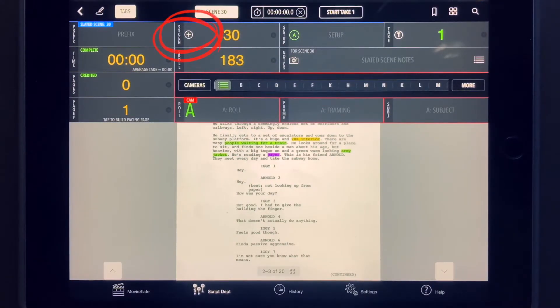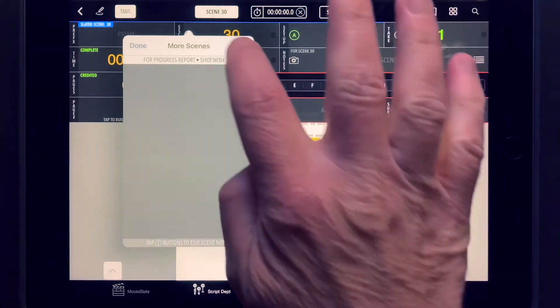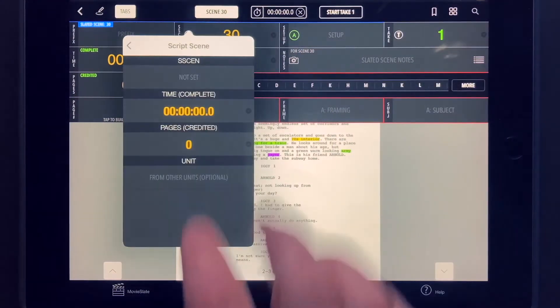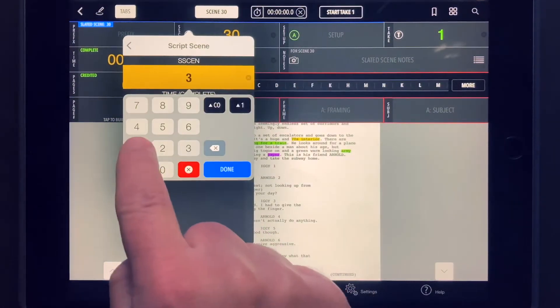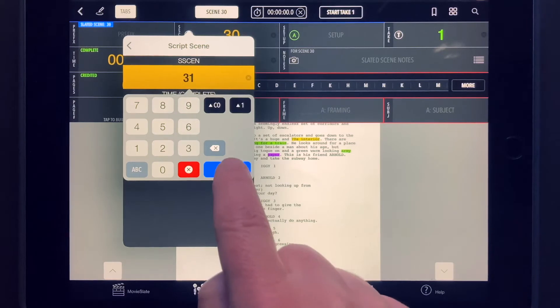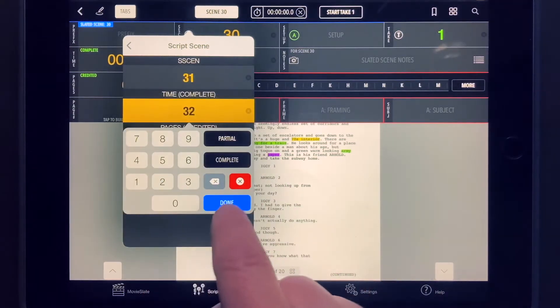Tap the Scene Fields plus button. In the More Scenes screen, tap the plus button. Enter the additional scene number, time, page count, and filming unit.